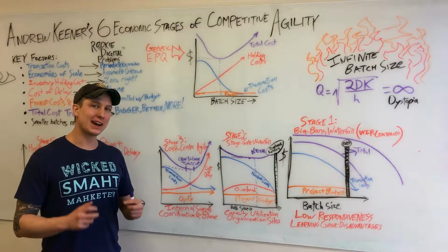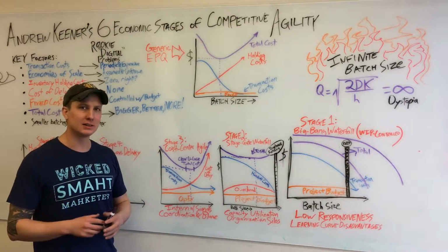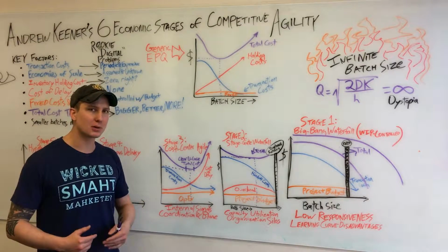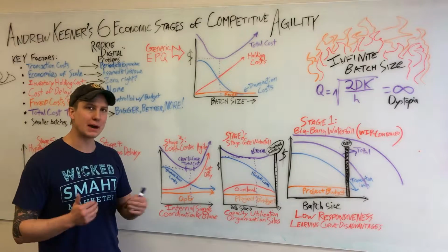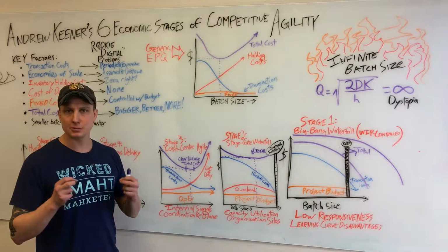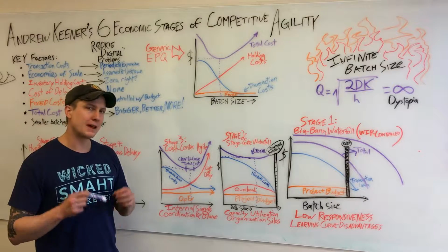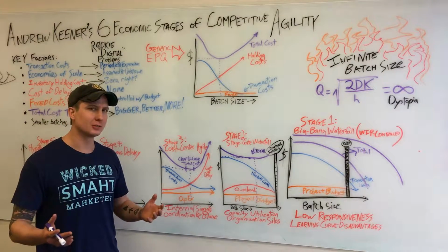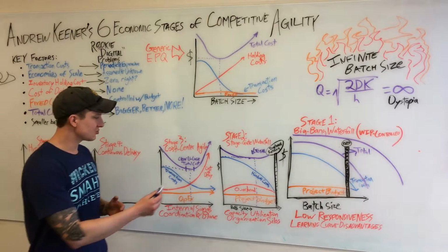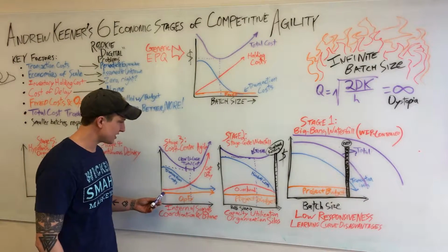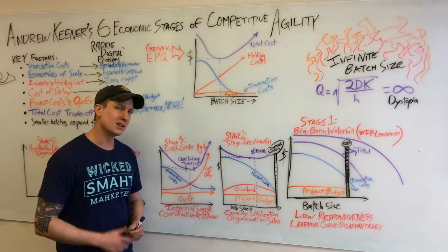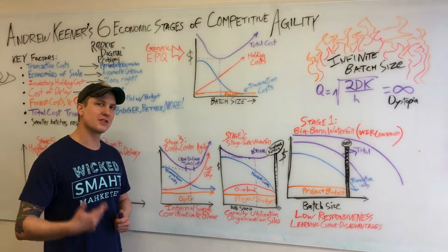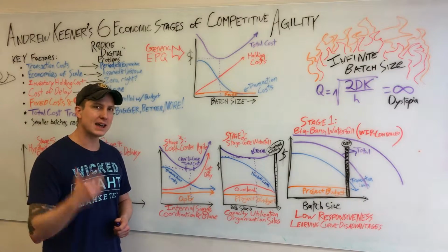When we look at Scrum or Kanban as a form of agility in which we can respond to the signals within the enterprise faster for better information about our own product development cycle, at that point we do see some significant changes, most of them intentional. Batch size gets driven down because there is a real sense of a cost of delay. And even if you're not actually tracking it, you create more of a sense of urgency by a cadence of checking back in.